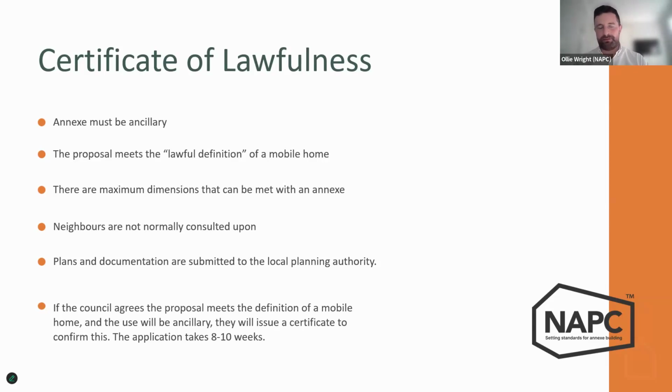And then, like I said, it takes about 8 to 10 weeks. If they agree that our proposal meets this lawful definition, they will issue their certificate of lawfulness to say, yes, we agree that what you're doing is lawful and you can go ahead and do it as you said you were going to. These applications are usually reviewed by the council's legal team. So it will go to the officer at the council, they will look at it, and then pass on their recommendation to the legal department of the council, and then they will sign it off. So we know it's all legitimate and it gives you peace of mind that what you're doing is lawful.